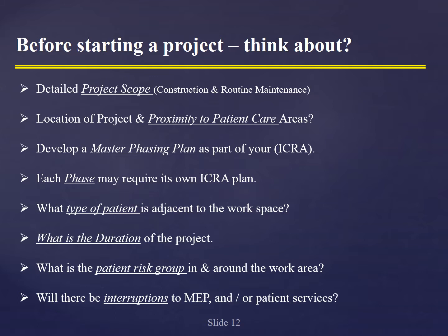Think about what happens if you have an interruption to an air handler, and that air handler feeds some supply rooms, and that supply room has some clean supplies. They have to maintain a specific temperature and humidity, and you're only off for 6 hours or whatever, but it's really hot outside, and that humidity changes and the temperature changes. Again, those are the kind of things we don't necessarily think about, but temporary interruptions can absolutely affect our infection control situation.